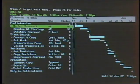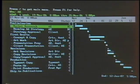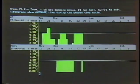But we've got a problem up here. The R is the problem. That's telling us that I've got some sort of a resource problem. What I can do with resources is I can go into a particular spot that we call a histogram and take a look at that particular period of time. Right now I'm looking at the account executive up here and an assistant to the account executive down here. And you notice here's a spot where my green bar is above the line. Well, that means the account executive is overbooked.